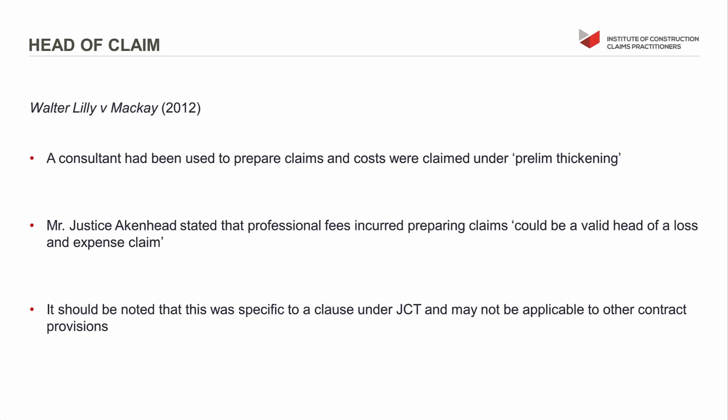But as part of that judgment, the judge in the case, Mr. Justice Akenhead, concluded that you could recover professional fees as a head of claim, and the fees that he was talking about were for a consultant whose job had been, as part of that claim, to issue the notices and to work on the substantiation for the extension of time.